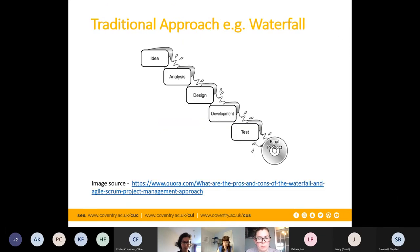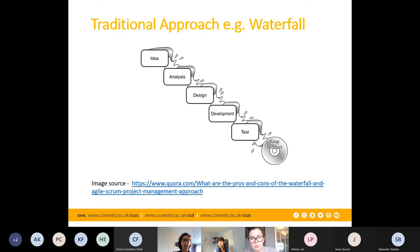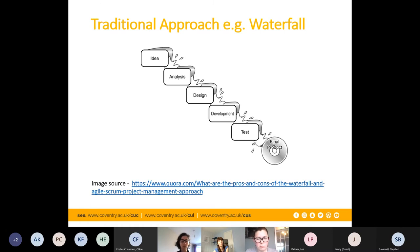Waterfall is the traditional methodology, better suited when you know what you've got — for example, building a bridge where the requirement is clear. Requirements are gathered at the start, then work is done and tested later. It operates over longer periods. When it goes wrong, it can go very badly wrong — you might reach the endpoint and realise everything is wrong rather than fixing it on the way. Prince2 is essentially a commercialised version of Waterfall, though it has tried to incorporate some agile elements. It's often seen as having too much documentation and governance, which can slow things down, but when done well, the whole idea of Prince2 is that it's scalable.